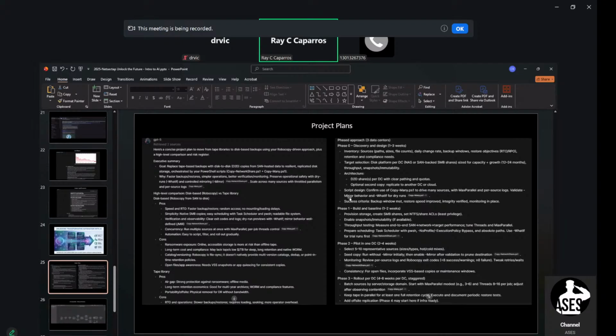But if somebody gave you this technical information, we have to do X, Y, and Z first, these are the dependencies before we can move on to the next phase, you could easily craft your timeline. Can we actually do this based on the number of people, the number of hours that we have? So you can project more, right? You have more data, more information before you present that to management and the decision maker.